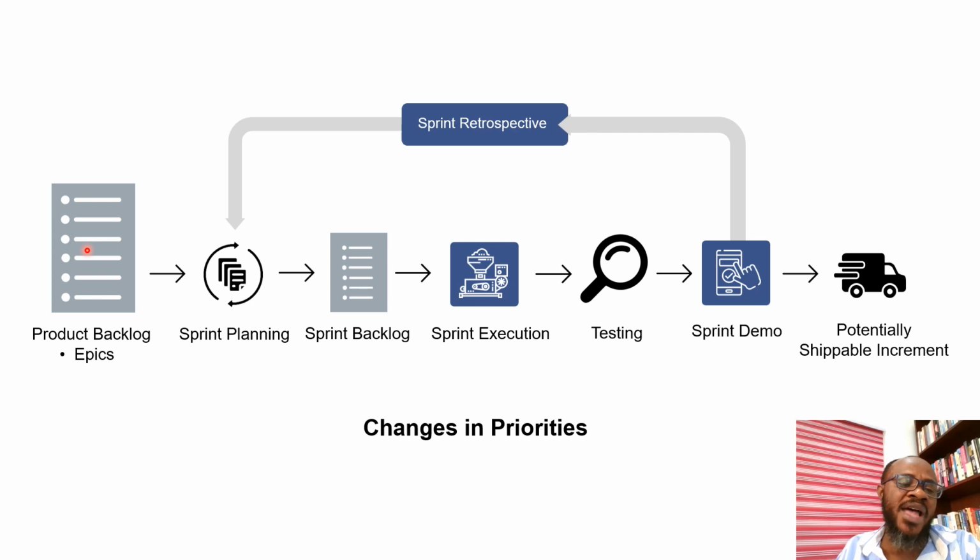Now, what that means is that from time to time, the product owner revisits the product backlog in order to confirm the priority of the works there, the order by which they have been positioned. Because in agile development, the works that are most needed appear on top. What is most pressing to the client appears on top and is fed into the next sprint. Okay, but it's the responsibility of the product owner to determine and make known the voice of the customer to the team by performing backlog grooming or reprioritization.